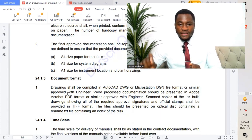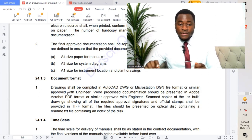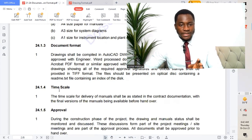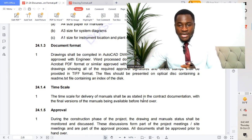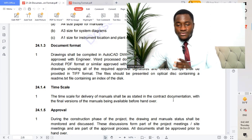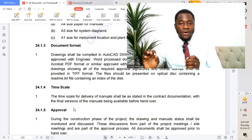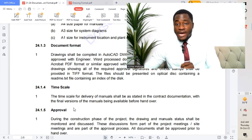Document format: drawings shall be compiled in AutoCAD DWG or MicroStation DGN file format, or similar as approved by the engineer — this is very important. Timescale: the timescale for delivery of manuals shall be as stated in the contract documentation, with the final versions of the manuals being available before handover.